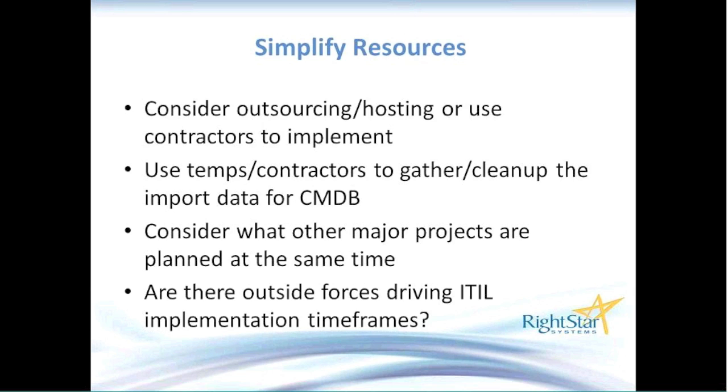The third item, consider what other major projects are planned at the same time. So if you're doing this as a project, you certainly want to consider your resources in light of what other things will contend for their time. And then, are there outside forces driving ITIL implementation timeframes?